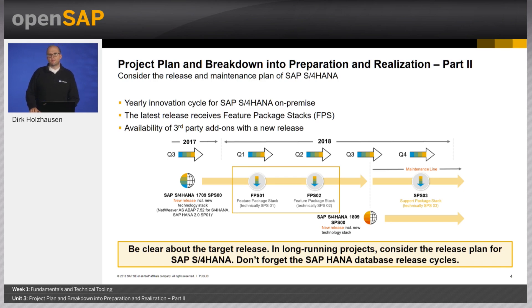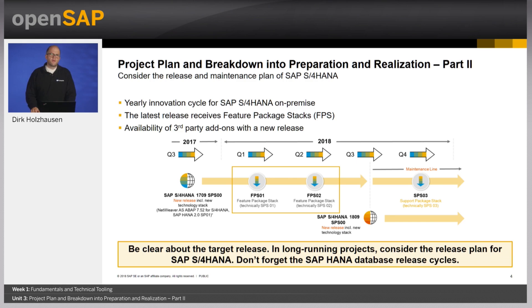S4HANA on-premise has yearly innovation cycles, meaning a new release is planned to be published once a year. At the time of this course, S4HANA 1709 with Feature Pack FPS2 is the current available release for on-premise, and in September a new release, S4HANA 1809, is planned to be released. These release cycles need to be considered in the project plan, specifically if you have a long-running project. It is recommended to clarify the S4HANA target release upfront that you are planning to go live with.